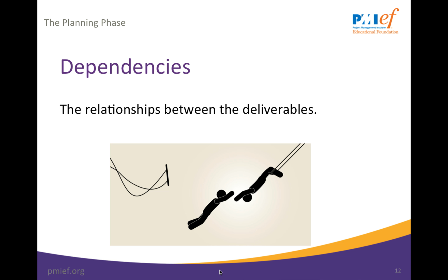One activity or task must be completed before the next can begin, which is dependent. Independent, the activity or task can be completed at any time and is not related to some other thing being completed. Sequencing is one of the most challenging parts of scheduling, but it is critical. It will affect when the milestones fall based on how the dependencies affect the workflow, and also how effectively activities and tasks can be accomplished by working on independent items simultaneously.